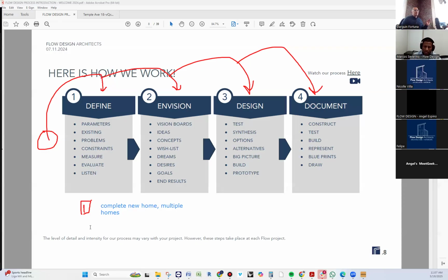It's required. Number 2, is it a full gut? And I'm going from the biggest to the smallest now. So the biggest is a new construction. Is it a full gut? If it is a full gut of a residential building, it could be 1 unit, 2 unit, 3 unit, 4 unit, 5 unit, 6 unit, 7 unit. I don't care. If it is a dwelling unit and it's a full gut, you need to understand that a Harris rating will be required. Okay?